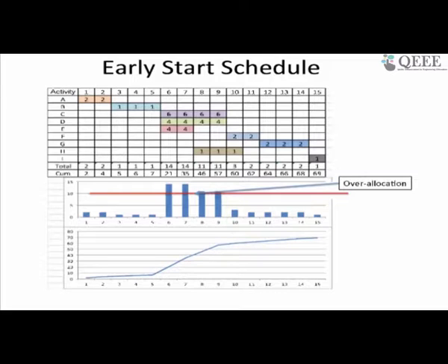So 2 here, 1, 1, 6, 4, 4, 14, 14, 11. I've done this addition and basically got the total. I wanted you to get this first. Now when you put the first row, we can see the histogram here, and you can see that if I have only 10 trucks available for 2 days, I require 14. And this is not going to be possible.